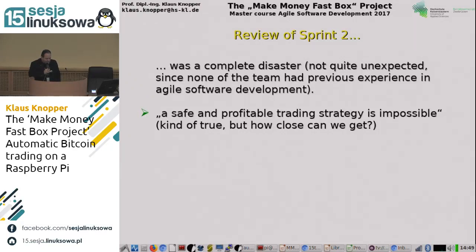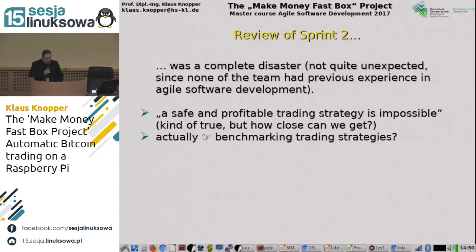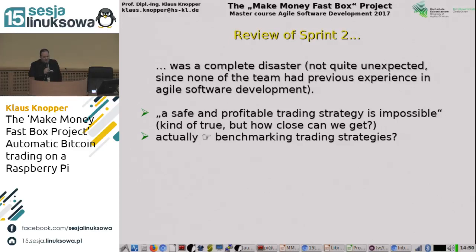What went wrong? A safe and profitable trading strategy is impossible — well, that's kind of true, but how close can we get to something that actually gains revenue? People are doing it all the time, so why not us? I would have expected the students to conduct benchmarks — having old Bitcoin and Euro prices and comparing how well this or that algorithm performs if fed the old data. That was not done in sprint two.